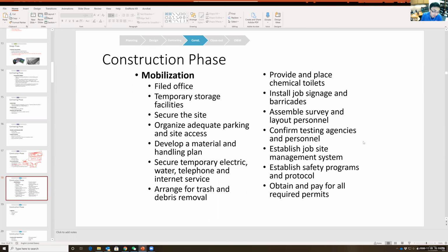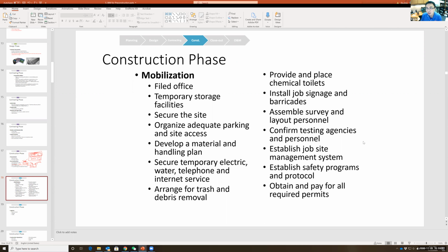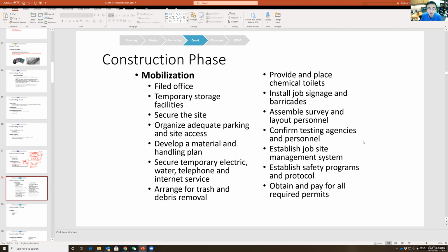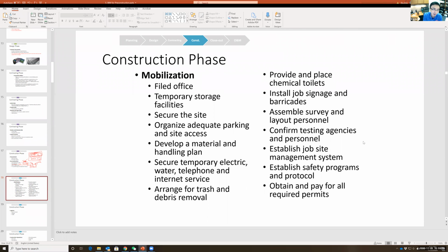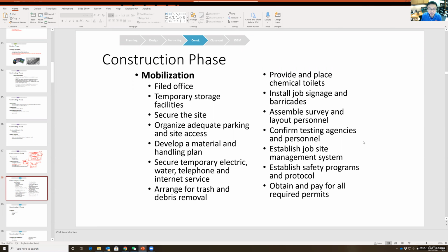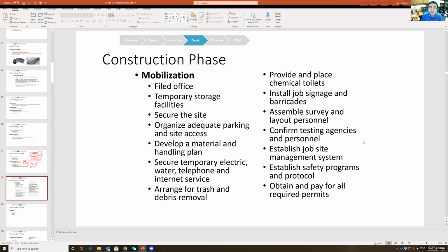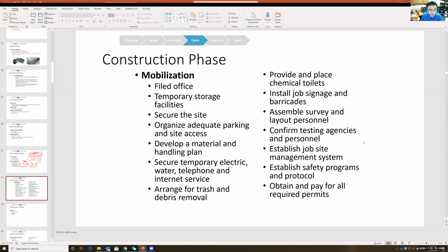Why? Because a lot of power plants are built very close to water, to the ocean. But those places are also great places for housing, right? For vacation houses. So the land for you to have all the temporary storage and for the parking is very limited. So they had to find a place to park all the 1,000, 2,000 cars. And they use the shuttle to move their workers. That is a logistic. Once again, that's a logistic disaster.